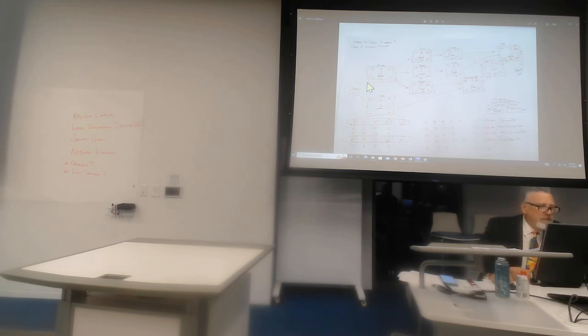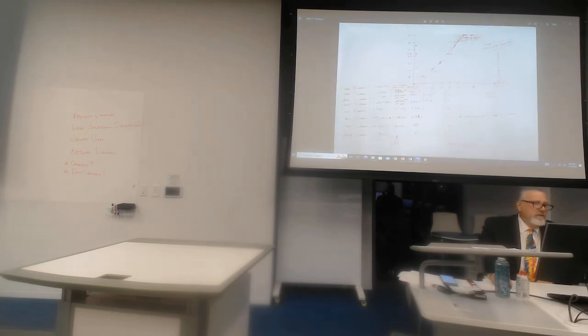Okay, so the other critical path, A, E, it's $11,000 to crash E, $5,000 to crash H. Once again, I and J are the same as we just said. So we've got the cost of crashing, and I kind of did it this way. There's a better way. I ran out of paper. There's a better way of planning it over again and copying it right. So I started at the bottom to crash 1 week for $8,000.